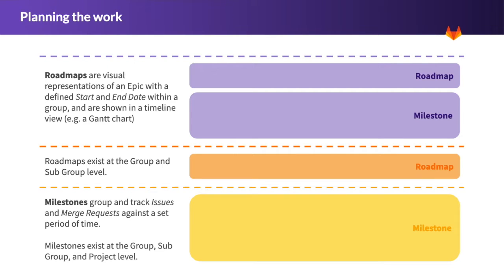Roadmaps are visual representations of an epic. They have a defined start and end date within a group and are shown in a timeline view, similar to a Gantt chart. The epics roadmap page shows a visualization for all of the epics which are under a group and its subgroups.